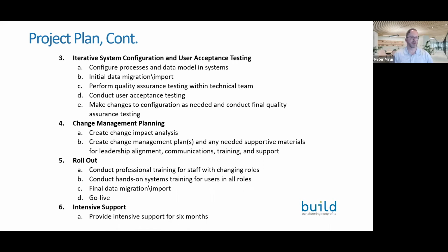And then you're going through the steps of a traditional rollout process. Even with the level of detail that's here, this is a pretty high level of summary for a project plan. It's just at the level necessary to get all stakeholders on the same page for a project charter review and kickoff. There would need to be additional depth of detail to actually manage the project.